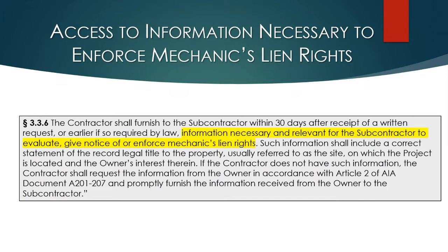But if you're doing jobs outside of Florida, the other states have different lien laws, and they may not require a notice of commencement. And in those states, you would want a provision like this to make sure you can get the information from the contractor to preserve and perfect your lien.